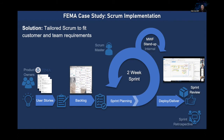Every two weeks, our team looks at the backlog and pulls high-priority items into the sprint for sprint planning, as well as creating new cards based on the priorities for that sprint. We also consider leaving some wiggle room for ad hoc tasks, because one of the challenges in emergency management is that with little to no notice, something new will come in that needs to be done at very high priority immediately. Leaving a little room in sprint planning for ad hoc tasks keeps you from getting behind or too overwhelmed.